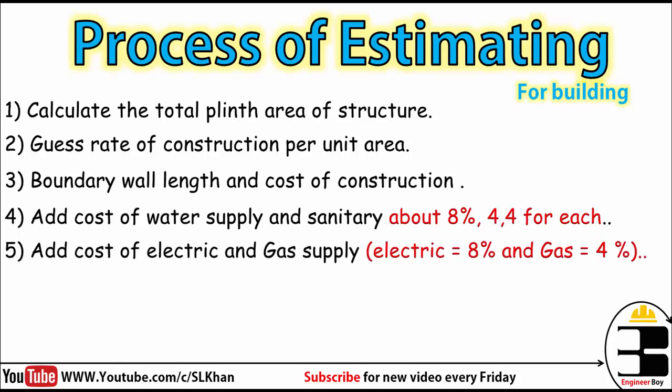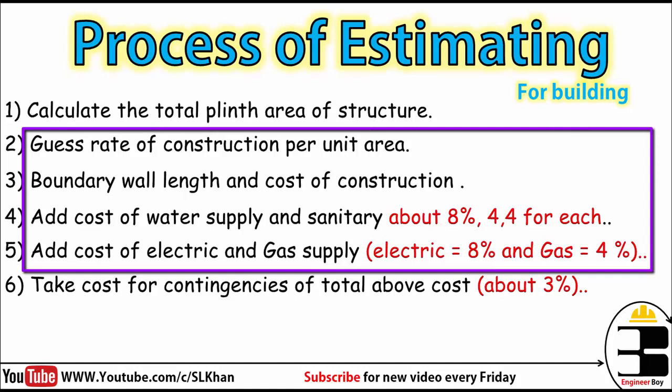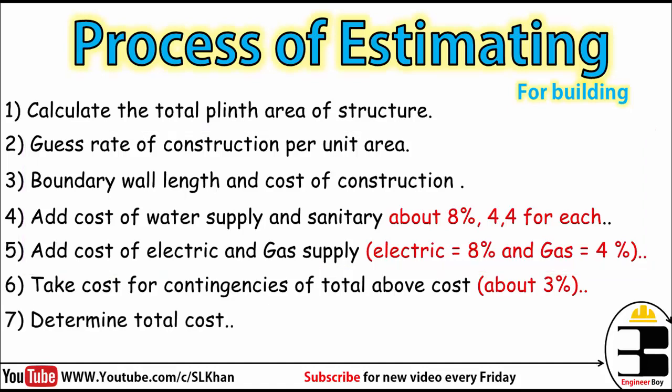Then we add the cost of electric and gas supply — 8% for electricity and 4% for gas. Then we add the cost of contingencies, which is about 3% of the total above cost. Finally, we determine the total cost by adding all these items together. These are the basic steps used to determine the rough cost estimate of a building based on the plinth area method.